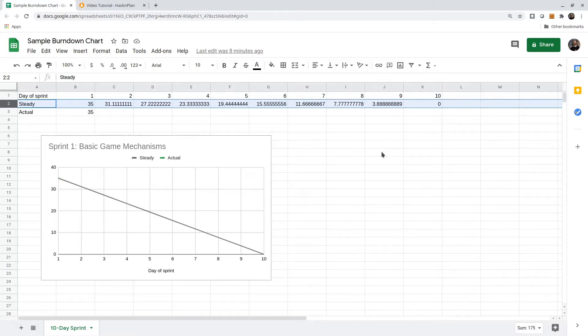The next line down records the actual number of hours estimated remaining at the end of each workday. We start with 35, which is the same.